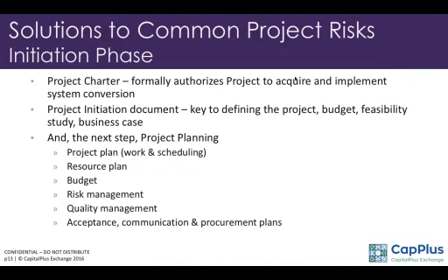We need to consider risks and the constraints, and at a higher level, formulate a work breakdown structure, basically more like an implementation plan. So that's basically the first thing that you need to do. Then you need to do the project initiation document, also described in the toolkit. It delves into more detail and background of the project to provide a firm business basis for the undertaking. This document includes the business case, the feasibility studies, and the project budget.